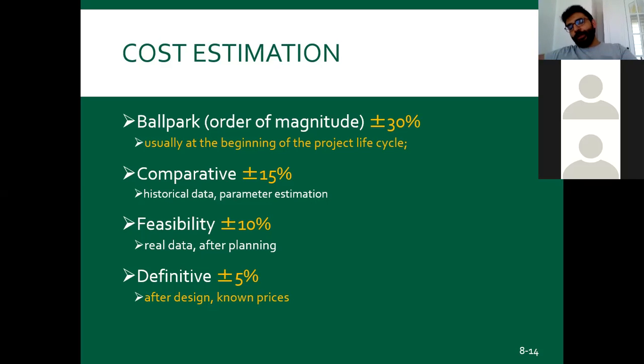For example, you are looking at the previous 30 houses which were opened last year in that Bahçeli district, and you ask them their costs. So you say if they are making this amount of cost, I would probably do a similar amount of costs. It's a more accurate one, but it's again about 15% inaccuracy in general.